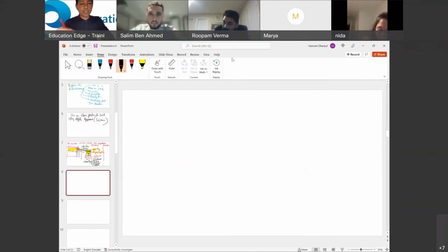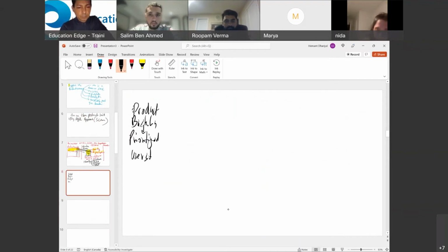So you joined a project, you did all those good things that you do, understand the need and all those things. You have sketched or created the product backlog. The product backlog contains prioritized user stories. Once the product backlog has been established, or it is in a stable order, at this time the first event of Agile starts, called iteration planning.